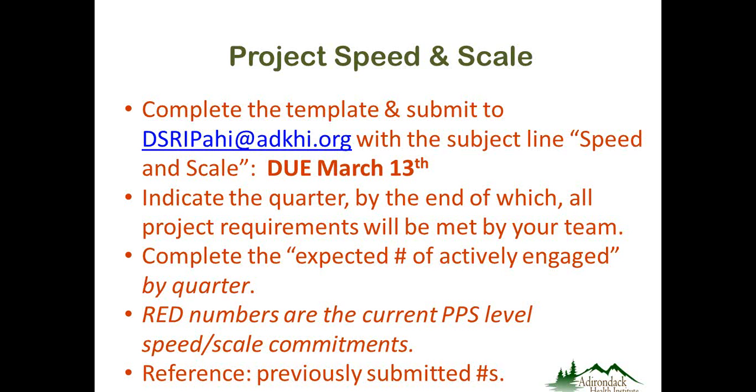When we look at that speed and scale template, you'll see that there's a box where you can indicate the quarter by the end of which all the project requirements will have been met by your team. In addition, there's a spot where you will complete the expected number of actively engaged patients by quarter. On the template, you'll see some red numbers. Those are the speed and scale commitments that we've already made.